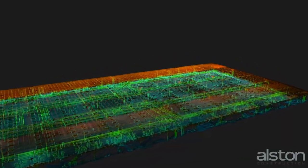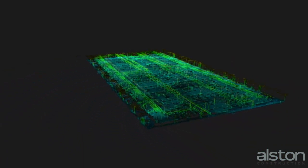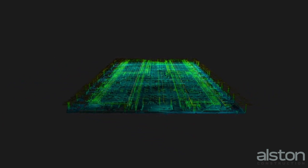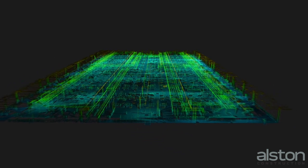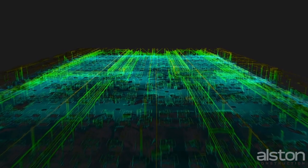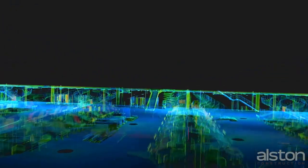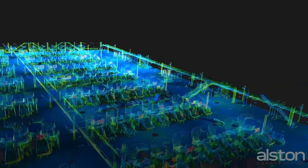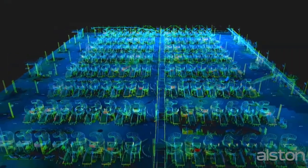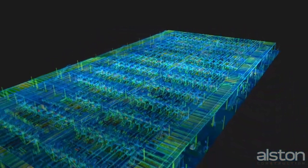As construction continues, our VDC team makes periodic site visits to document the construction progress, utilizing 3D scans so that the BIM models can be updated with as-built conditions to further ensure there aren't any clashes. On RNT9, the Amazon ARSC in Fife, Washington, this technology was used to verify over 300 chute locations, and work was able to continue until the third-party Amazon vendor, KSI, was able to get to the site the following week. This was a critical component to keeping the project on track. Another example of this technology was the verification of the SOG and mezzanine concrete FL numbers and confirming that all concrete embeds were placed properly.